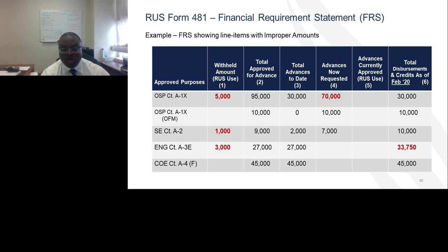However, if you look at column 6, in this example, the awardee is showing $33,000. That is in red, showing that's a problem because that $33,000 exceeds the column 3 amount, which is $27,000, the funds approved advanced by our US. And not only that, it exceeds the total contract amount, which is the total of columns 1 and 2, which adds up to $30,000.